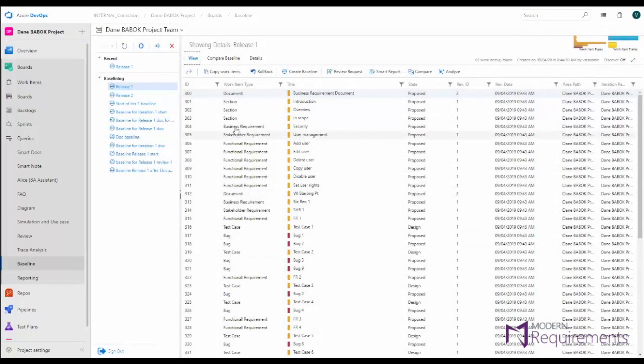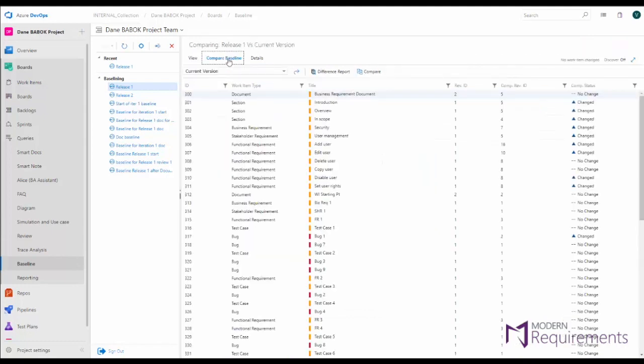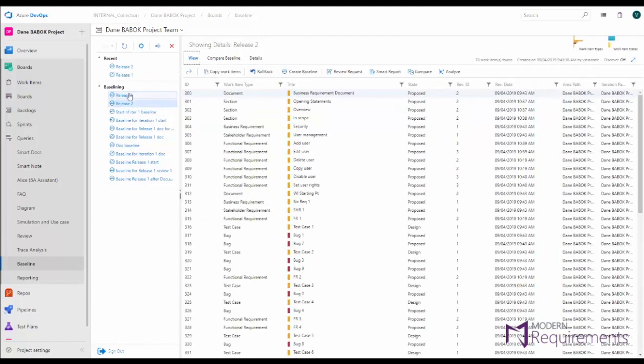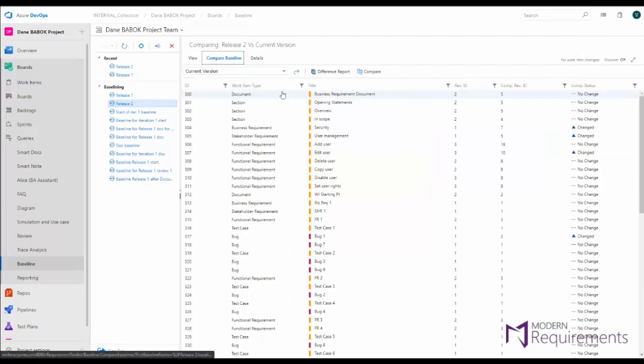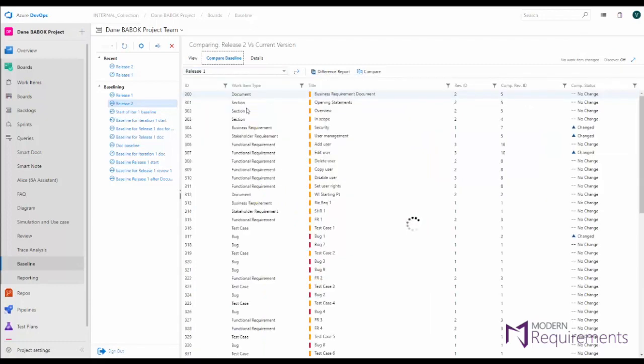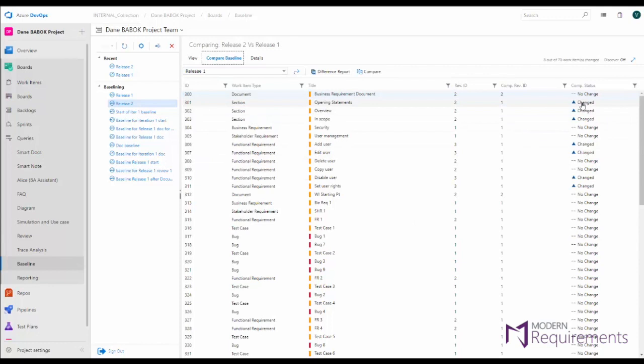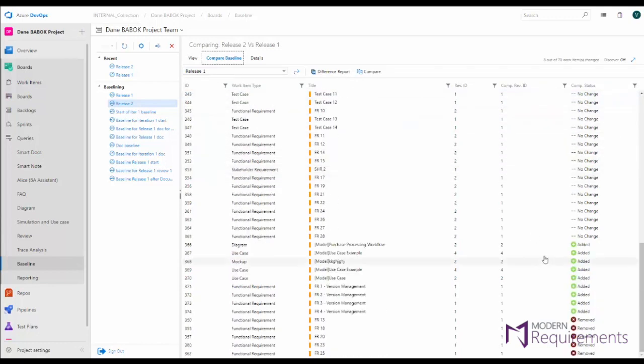Now we also let you roll back entire sets of work items using our rollback tool or do comparisons of two separate baselines so you can see exactly how requirements have changed from one release to another release or even go through and see how requirements have changed over the course of an iteration. These compare baselines will also show you not just the deltas but any requirements that were added or removed during that course of time.